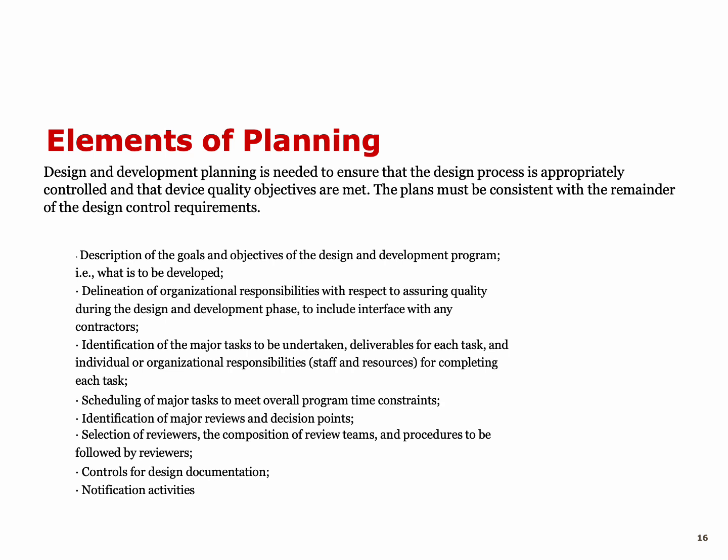So we are going to write down in the document what are the major tasks to be undertaken for our specific device. Same thing for deliverables of each task and individuals or organizations who are responsible to perform those tasks. Then we also need to describe or to write the scheduling of major tasks to meet overall program, and then identify major reviews and decision points, etc. They talk about the notification activities and controls for design documentation.